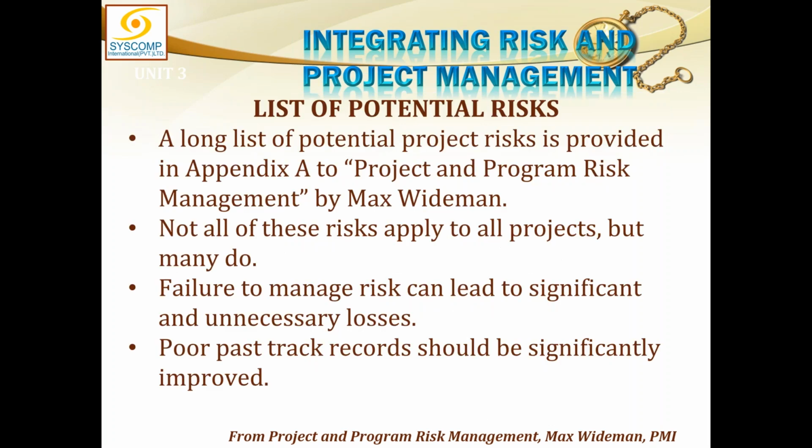A long list of potential project risks is to be created, and this book, Project and Program Risk Management, by Max Wideman, has provided a long list of risks. It is like a historical record, with a lot of things which could happen to any kind of project. So he has listed down many things. This could be used as a checklist, and you can see whether each risk applies to your environment or your project or not. Similarly, Rita Mulcahy's book also gives a long list of risks, which is even a better list.